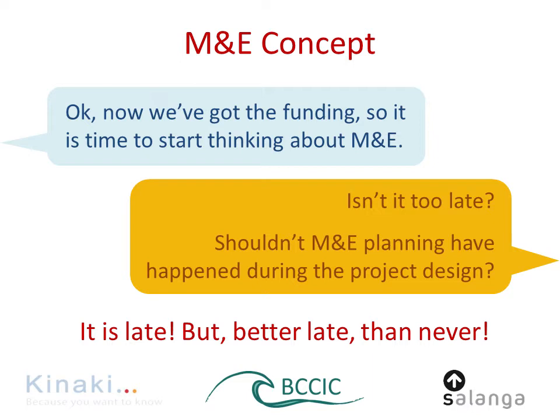that's more like an assessment of the project achievements, and we try to look at the achievements through several lenses. In Canada, commonly used lenses could be efficiency, effectiveness, sustainability, or relevance. Different donors may have different requirements in terms of evaluation. Sometimes you can hear that evaluation is called more the level of the survey. But throughout this course, I will be using monitoring to cover all activities that are looking at the achievements throughout the project, while evaluation is a one-time event, either at the midterm of the project and then at the end.